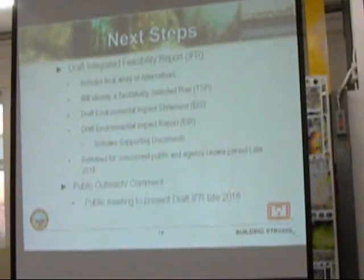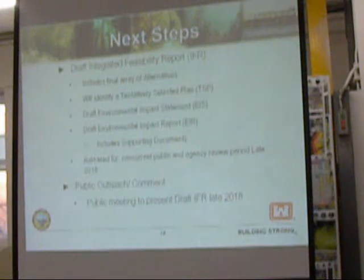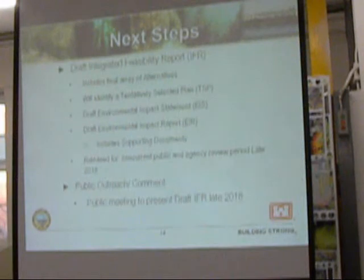That's the progress we've had to date. The next steps are to take those Best Buy plans — between three and five, as determined through the modeling efforts — along with requests from the city to include locally preferred alternatives. Those alternatives will meet the project objectives, including options for possible breakwater modifications. That final array will be summed up in the draft report, which will be released towards the end of this year. The draft report will include all those alternatives, the draft environmental impact statement, and the draft EIR, as well as all supporting documents for the modeling efforts.